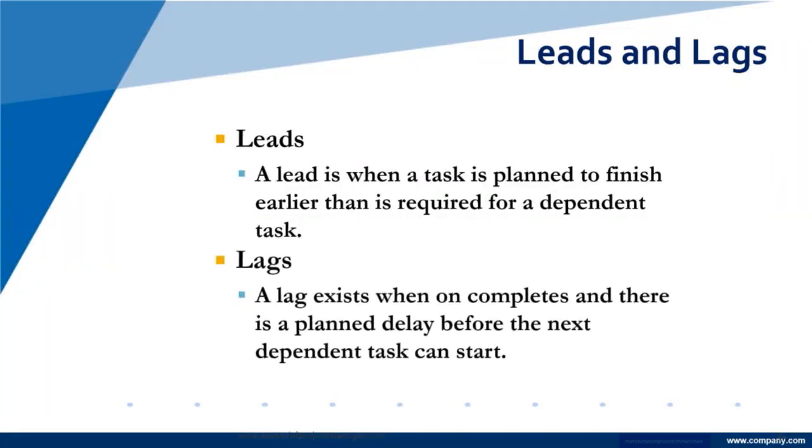Lags? A lag exists, and I will read, when on completion, there is a planned delay before the next task can start. For instance, big lag, if I pour concrete. I'm pouring concrete. It takes me 2 days. Poof. There's your concrete. It takes a number of days for that concrete to cure. And while it's curing, you can't do any work. So there's a lag between when I complete my task, I pour the concrete, and when you can begin your task of finishing the framing or whatever.